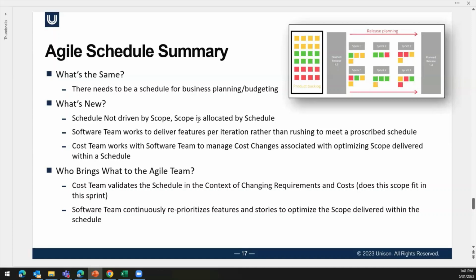And you've probably all seen that very dynamic upside down pyramid where instead of fixing scope and letting schedule and budget go all to crap, now we're going to fix schedule and budget, and we're going to do that by adjusting scope. We're not going to raise the bridge. We're going to lower the river, and we're going to build scope within those time increments that fits, and will deliver working software. And because we're doing that and we're getting working software into the hand of the user, they're going to be happy and everything will eventually emerge. But it's kind of like you'll be running when you hand the baton off to the next one, and you'll just keep running. So to do that, you have to be a single team in order to make it work.